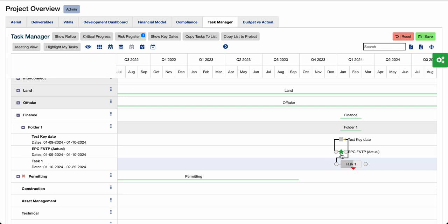So basically, the milestones, as I noted before, denote a point in time that is important for the project. They also drive scheduling of compliance items. So you can have compliance items whose start date is associated to a milestone. And if you untrigger and retrigger the milestone, that will result in the compliance item becoming rescheduled. And that logic is still valid now that we have the milestones in the task UI.